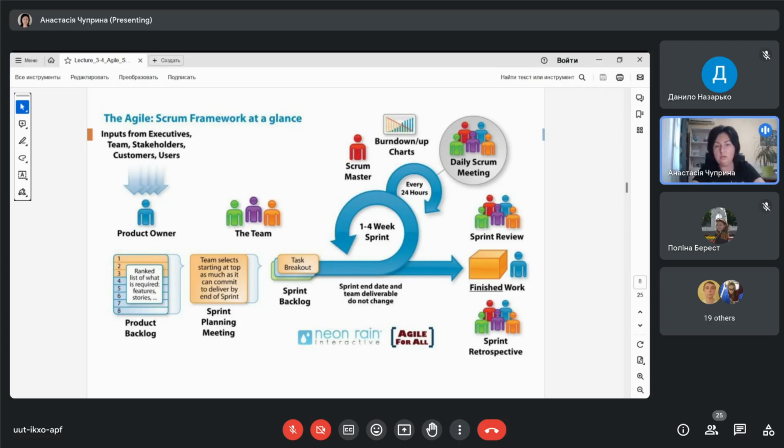One important thing, you have the list of tasks for the current sprint. The duration of your sprint will be 2 weeks, and in 2 weeks we have 10 working days. So, first of all, you have to estimate how many working hours you will have during the sprint, and you have to do it before the first sprint. Then each sprint will have the same duration.